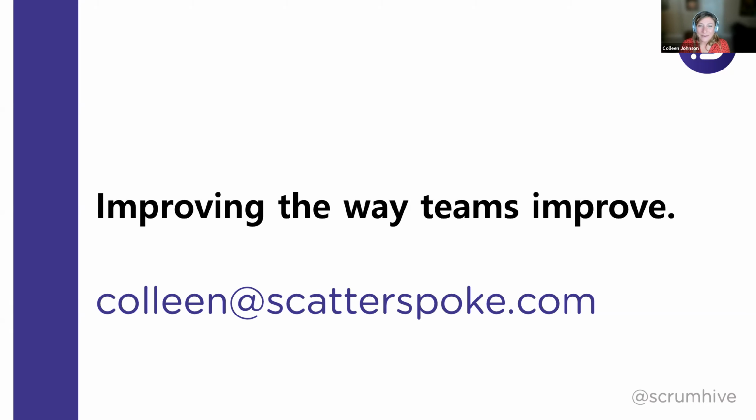Yeah, it's kind of round robin, but somebody stays so that you can say, well, Carrie was here, we said this, and then Carrie goes to the next one, and then Steve comes, and I tell Steve, okay, here's what we talked about last time. So you're keeping one common person at each station, and that can be a nice way to spread some of that around too. But I think the key part of kicking those off is pulling all that data together and identifying what we want to focus on as an organization, and then crowdsourcing the how.